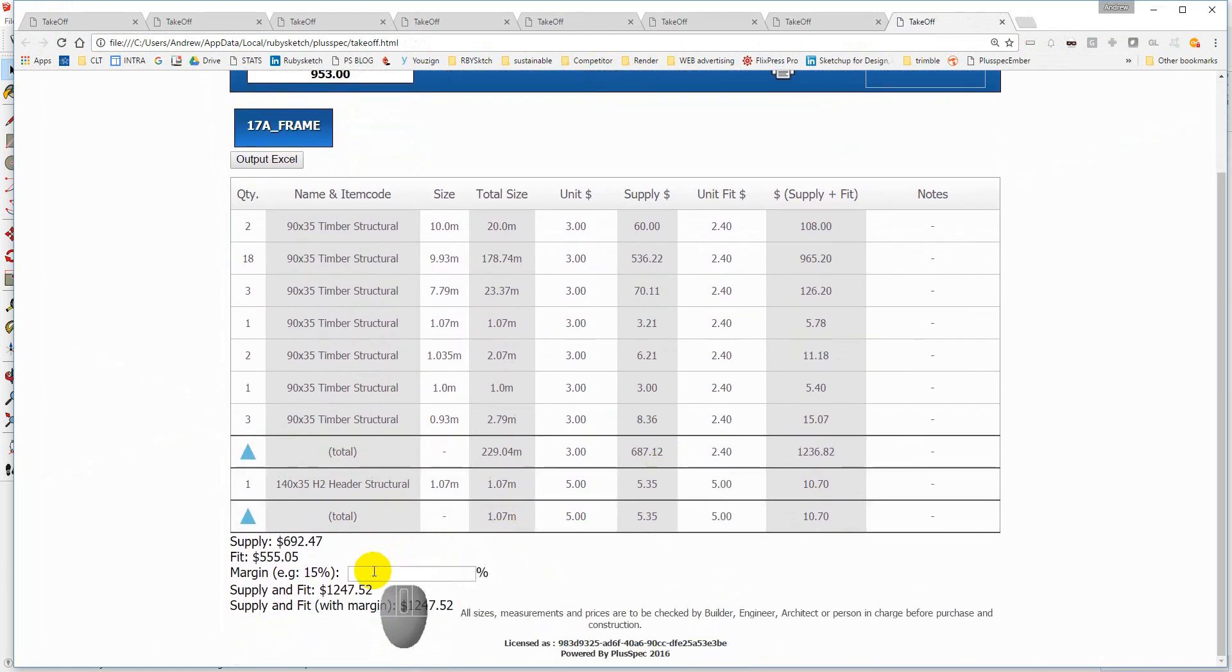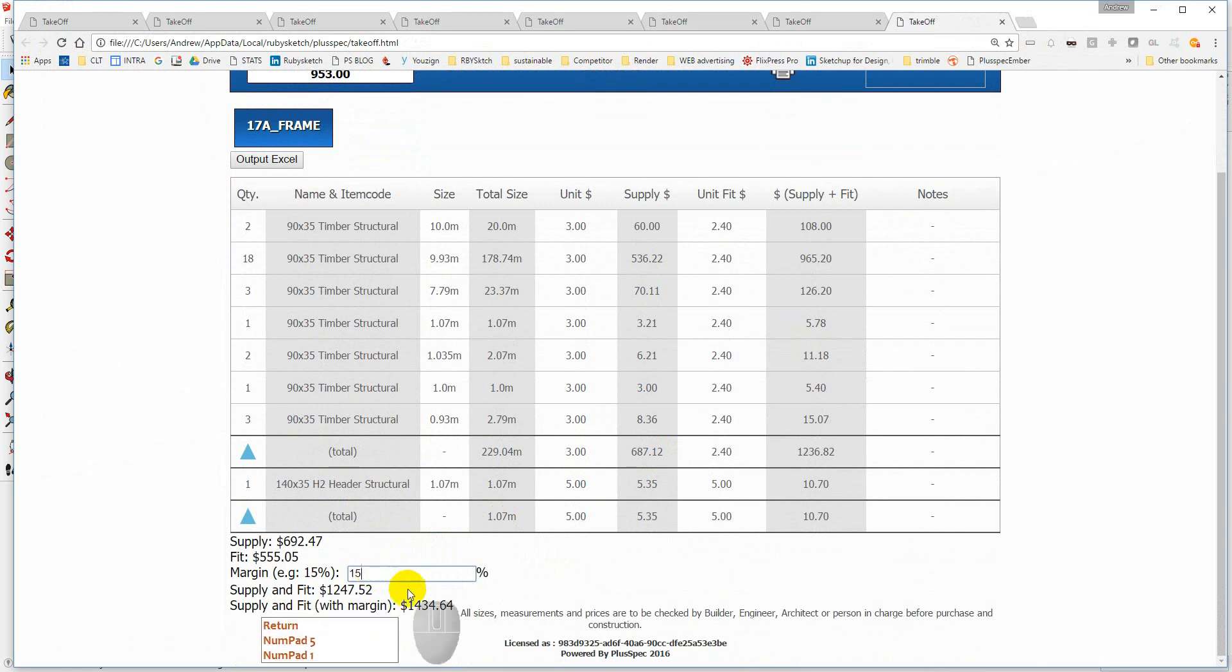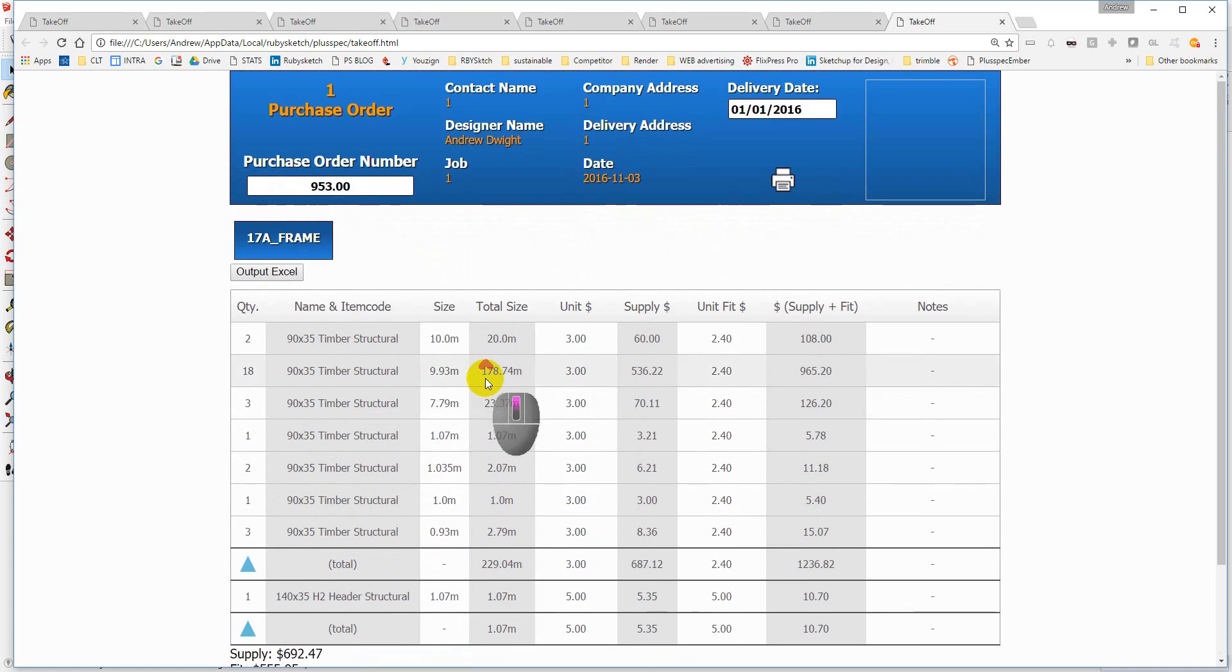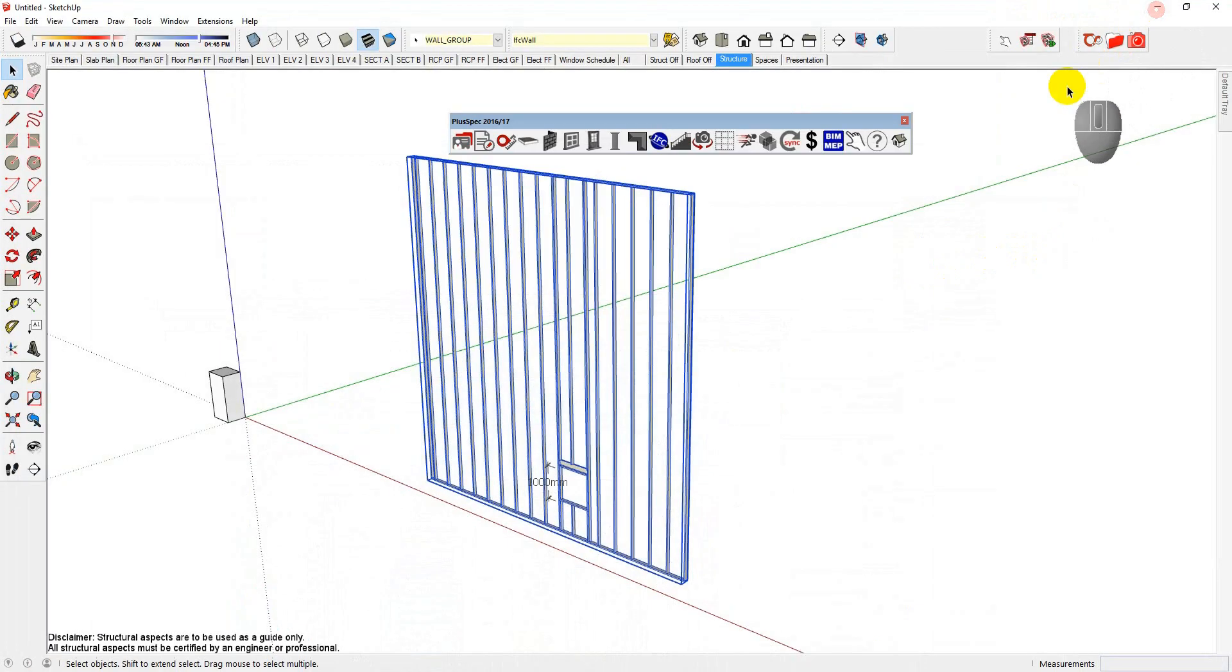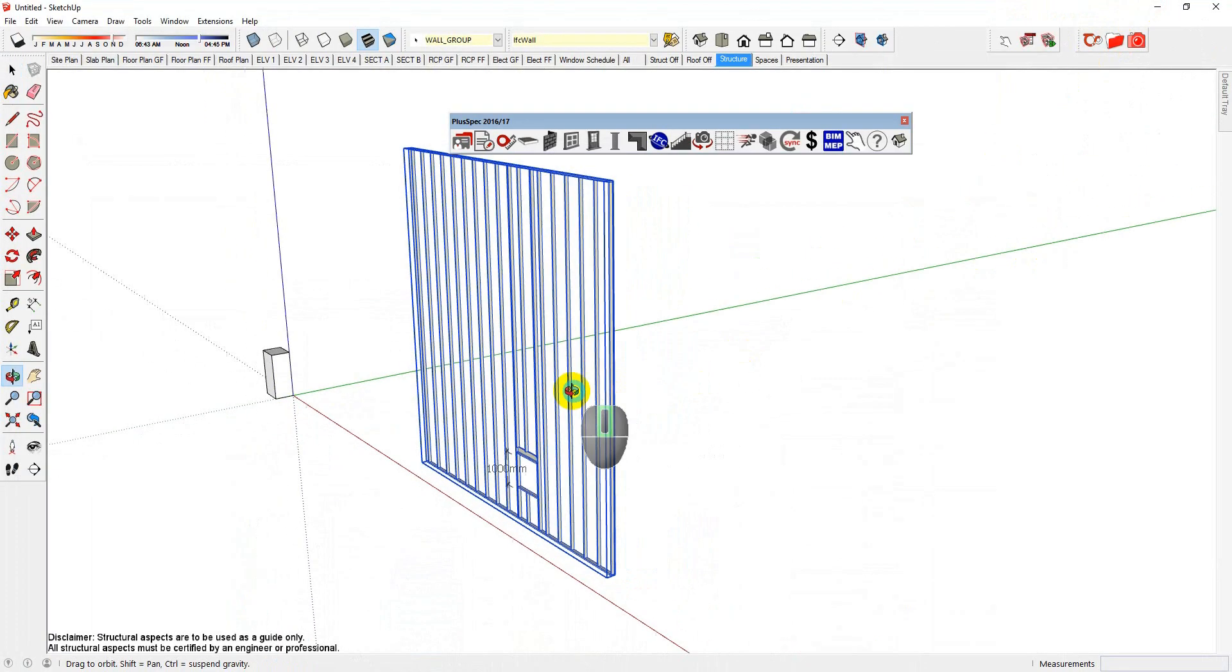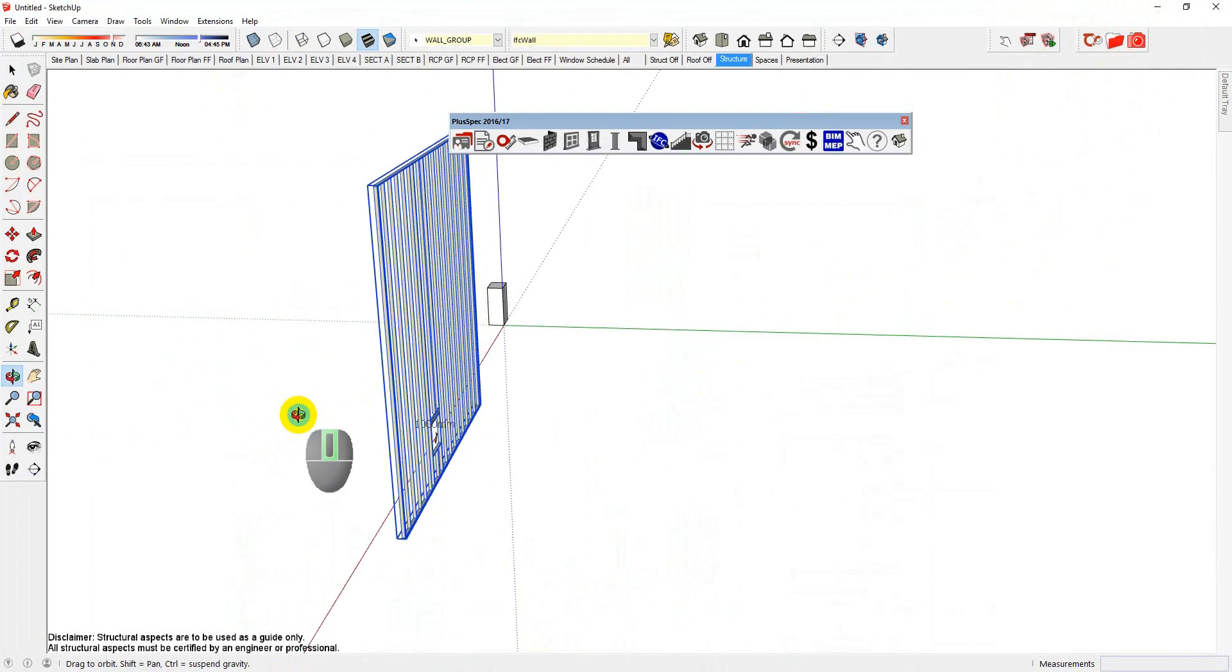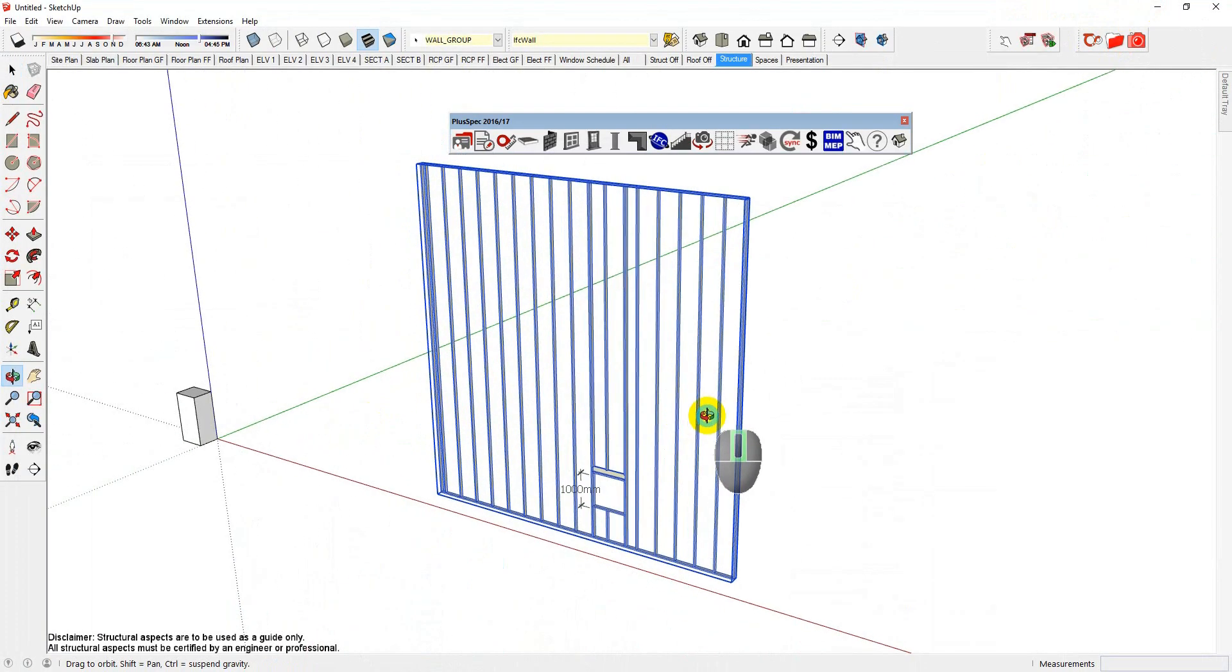Close it down. And now update it. And now you'll notice that my timber has my $5.00 a meter both ways. I'm starting to get a price together. If I want to add margin on top of my job, 15%, you'll notice that it's updating the margin on the job. So everyone has a different margin that they work to. I hope we all work on a larger margin than 15%. And away we go.